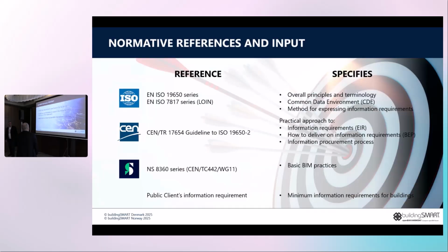Next, please. So the normative standards that we are referencing is the ISO 19650 series, which provides both terminology and, especially Part 2, the methodology on how to specify, agree and follow up requirements. Requirements are specified according to the level of information need. I know it's not allowed to abbreviate that, but I did because Marcia Volpini is not here.